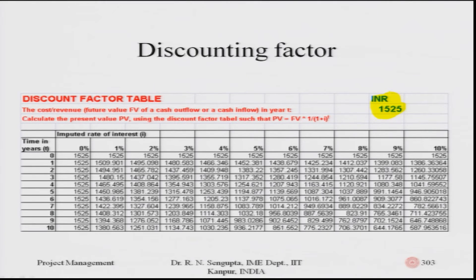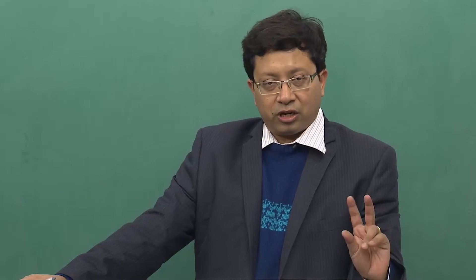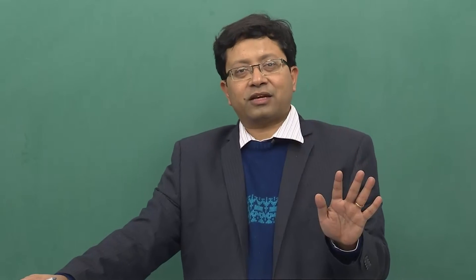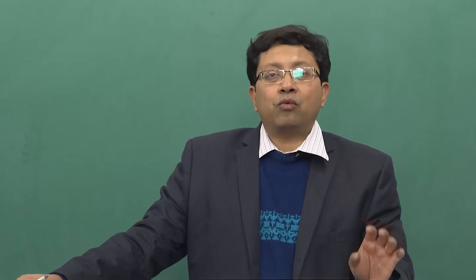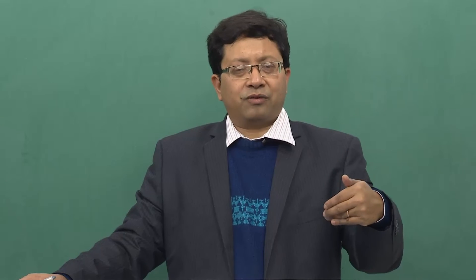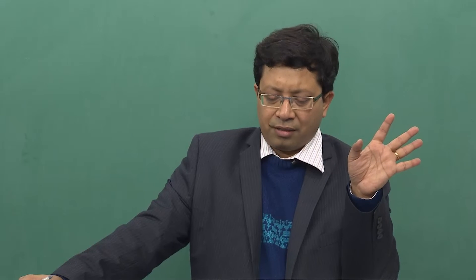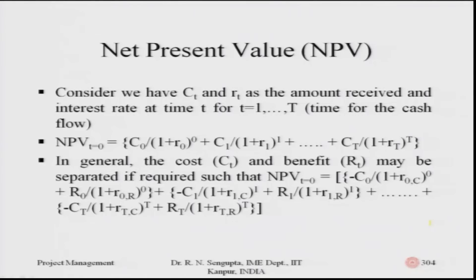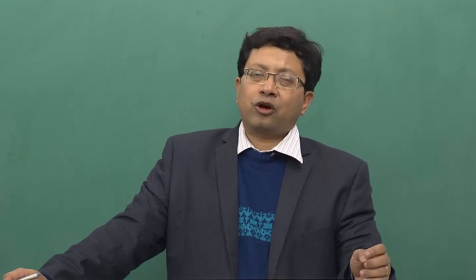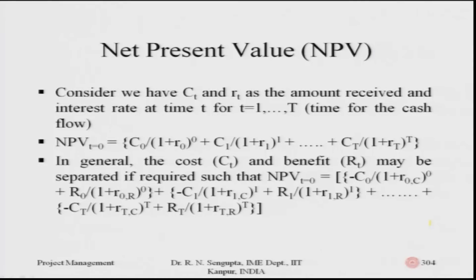You concretize the evaluation criteria — it may be cost, return on investment, or the interest rate charged to customers, compared against all competitors in the market. When you come to the allocation stage after design and plan, you develop a plan for allocation of resources: manpower, material, machines, and financial resources. You plan allocation in detail for each activity or sub-group of activities and concretize the evaluation criteria for allocations so each task has criteria feeding into the overall project criteria.